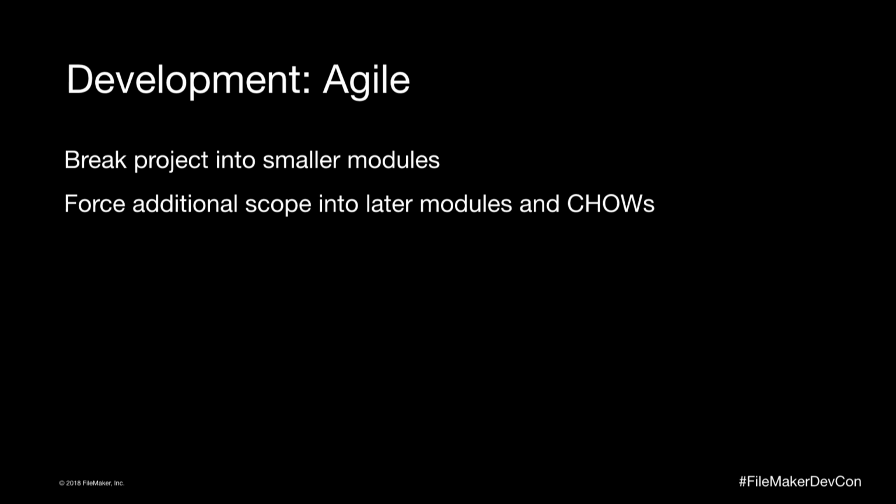This also helps with change control. While the Agile principle is that you take less time on your documentation, it is important, especially as a client, that you're handling change control very well and making change orders as needed. So you can take anything that's in additional modules and make those part of your change orders.